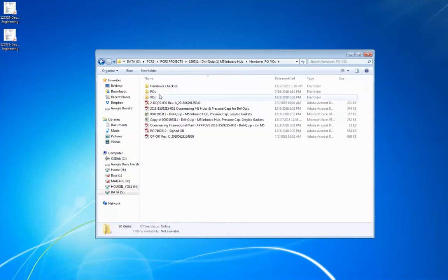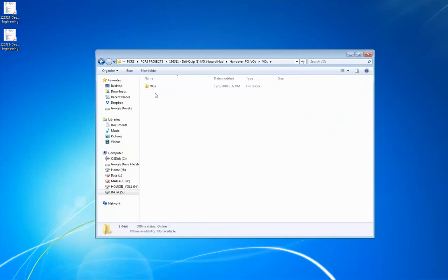Your PO, which came in, would stay in here. They put the PO over here, but then we go and plop it in here. Any variation orders you do will also stay in here. We as project managers handle the variation orders. The first sale comes from sales engineers, but then you are so involved in the project that for the variation order, you have much more knowledge of what they need and how. So you do the variation order.